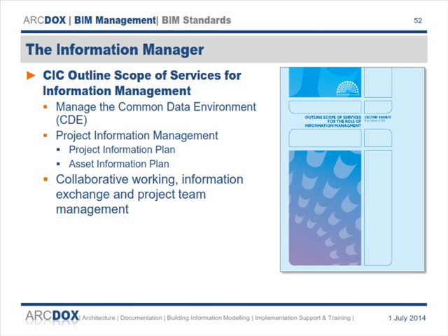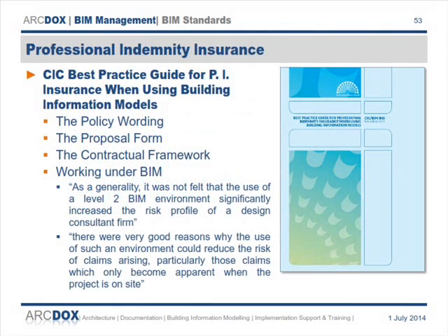Okay. The information management role is very specifically stated as being a non-design role on the project. It's not a new designer. He doesn't have any design responsibility. He's only responsible for receiving and passing on, or making sure that information is coming in the right way and that the BIM process is being delivered in the right way. So he's not designing anything, and isn't responsible for anything design-related.